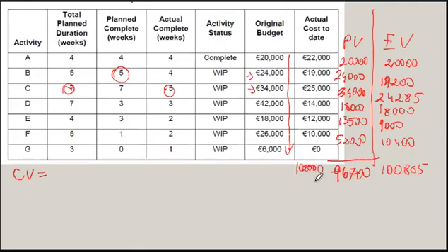2,000. So now I have actual cost. I'll add budget when I need it. Cost variance: 102,000 minus 100,885, that is 100,885 minus 102,000. So that will be minus 1,115. So that's cost variance, earned value minus actual cost. Schedule variance is earned value minus planned value.